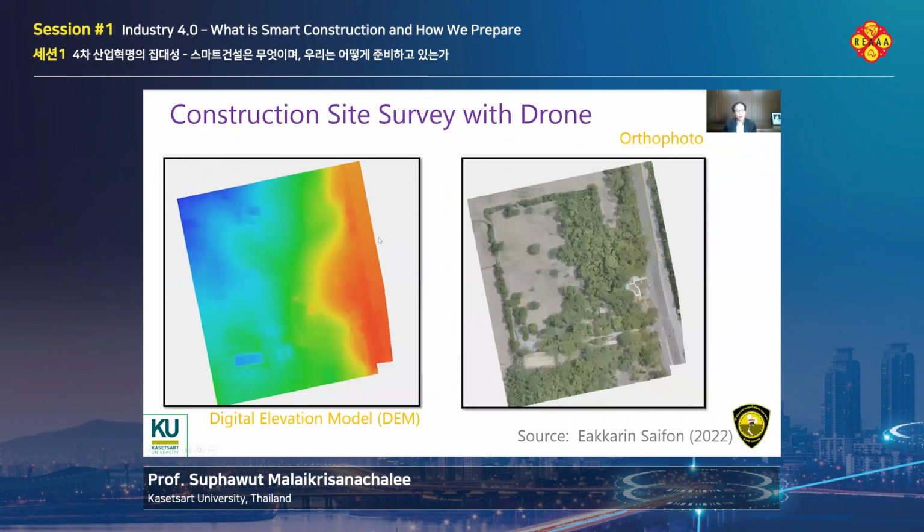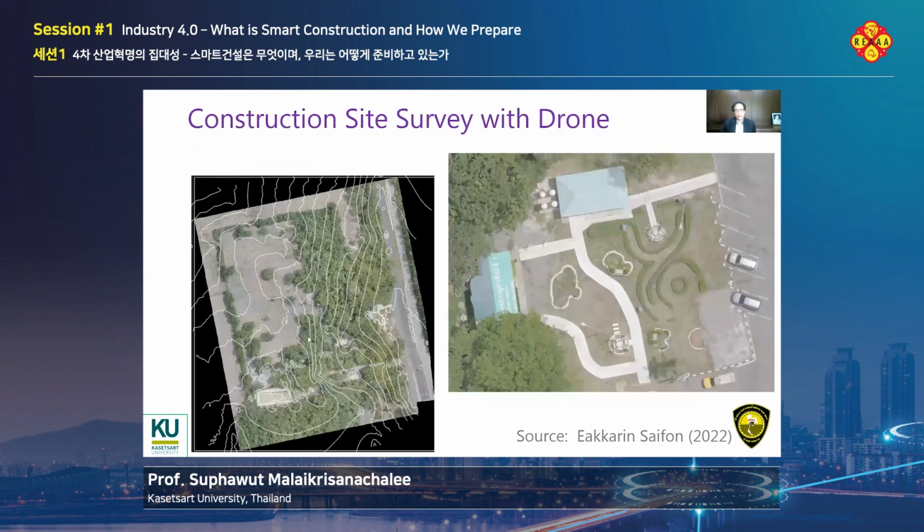And from the elevation point cloud, you can derive a digital elevation model, or DEM. So DEM is a representation of the 3D surface of the area. And then you can actually put the picture from the drone on top of it. And then you get a 3D surface of the area automatically. From that digital elevation model, you can derive contour lines. And from these contour lines, you can automatically calculate the cut and fill work of the construction very accurately.